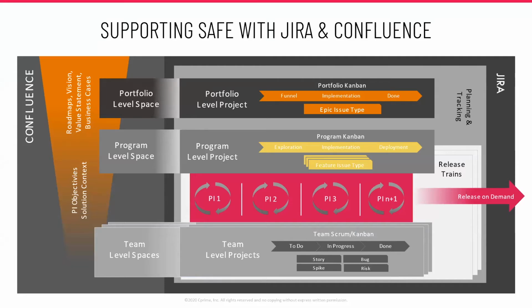Here you'll see what really represents our methodology, a great infographic. One of our main and primary best practices for building out that Jira infrastructure to scale is the one project per team architecture. What you see here is that every team will have its own project space, and every program and every portfolio each has its own project space as well. You'll get to see in a little bit how that all lays out and how you're still able to get reporting and things like that.